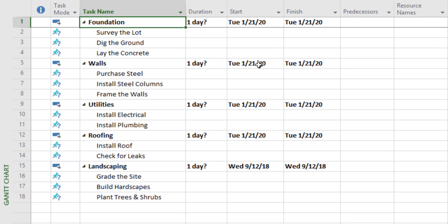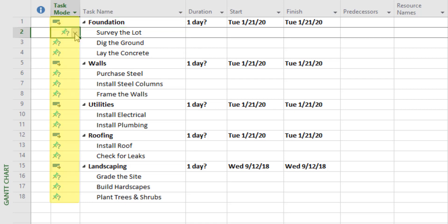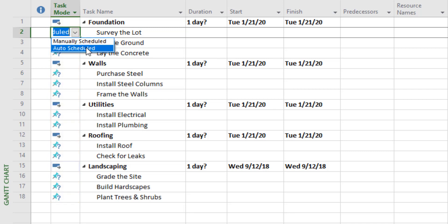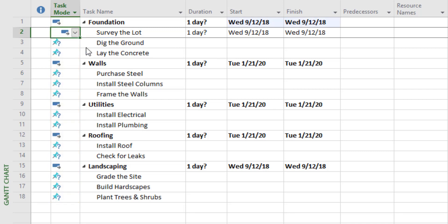The next step is going to seem kind of simple, but it really enables one of the most powerful features of Microsoft Project — it could save you hours and hours of time as you maintain your schedule. We're going to set the task mode from manually scheduled to auto-scheduled for all of our activities.